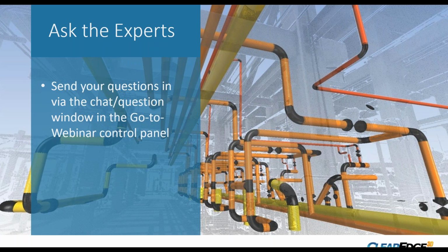But I also think it's a good mitigation tool, because when these things go in the wrong place, if anything goes wrong down the road, particularly with structure, you don't want to be the one on the hook. If you can document everything that is marginally off and get that signed off by an engineer, the project team, and the owner, that's a much better legal footing than somebody trying to blame you for a piece of steel that's 4 inches to the east or west that nobody ever knew about until something happened.